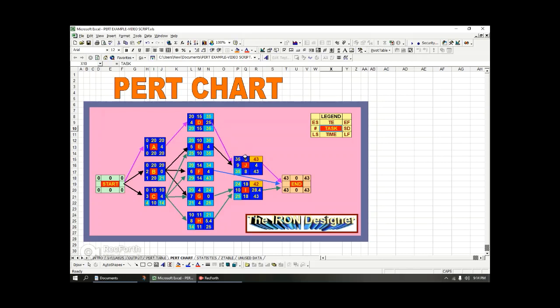So now you get to J. J starts when D finishes, has a duration of 8, gets to 43. And then J gives its 43 number to the end. But we have to look at I. So I, if you follow the path, no matter what the predecessors are and all that, 24 is the accumulation of all his predecessors' longest durations, right? Plus his own TE gives us a 42. So the larger of the two values goes into the end. So that's how you get the CPM value.